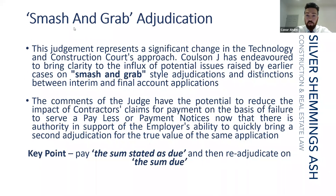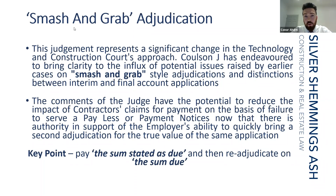This judgment represents a significant change in the TCC approach. Coulson endeavoured to bring clarity to the influx of potential issues raised by earlier cases on smash and grab style adjudications and distinctions between interim and final account applications. The comments of the judge have the potential to reduce the impact of contractors' claims for payment on the basis of failure to serve a pay less or payment notice, now that there is authority supporting the employer's ability to quickly bring a second adjudication for the true value. The key point is that in order to do so, you must pay the sum stated as due and then re-adjudicate on the sum due.